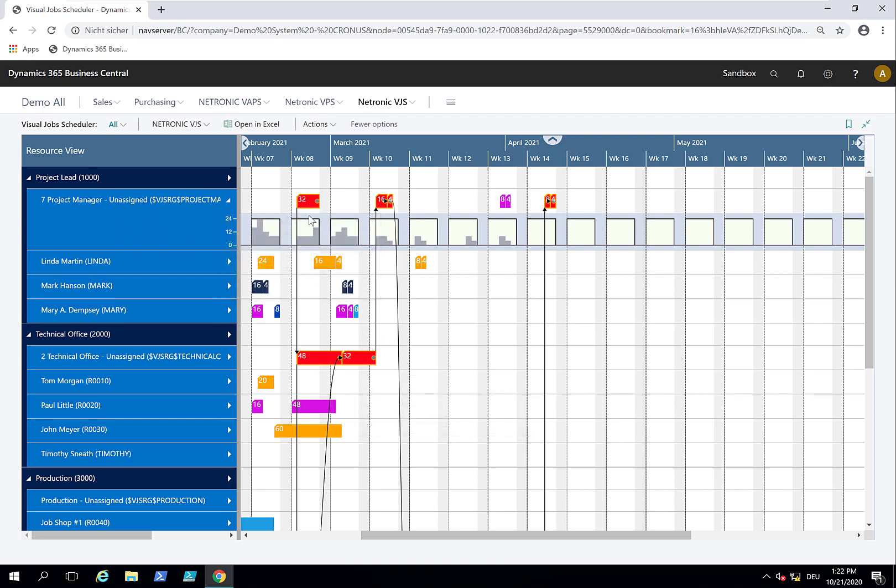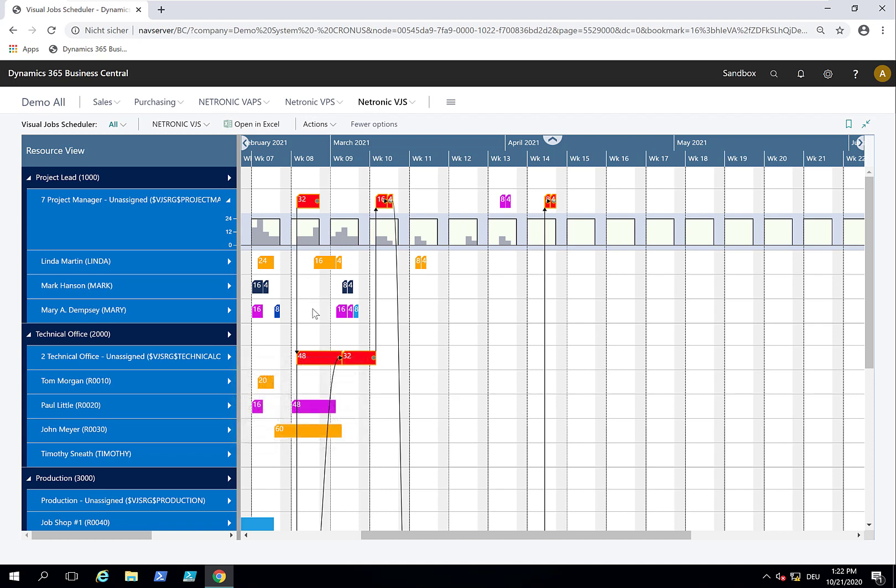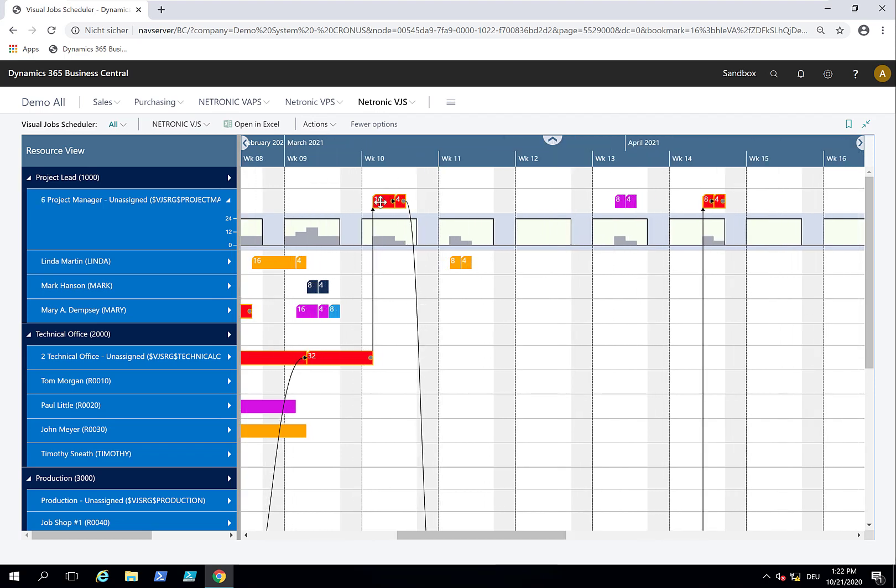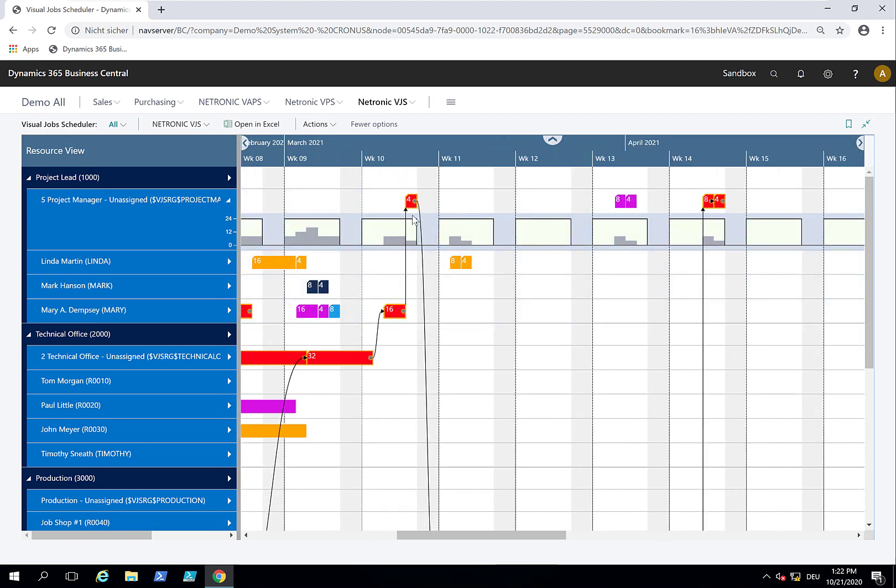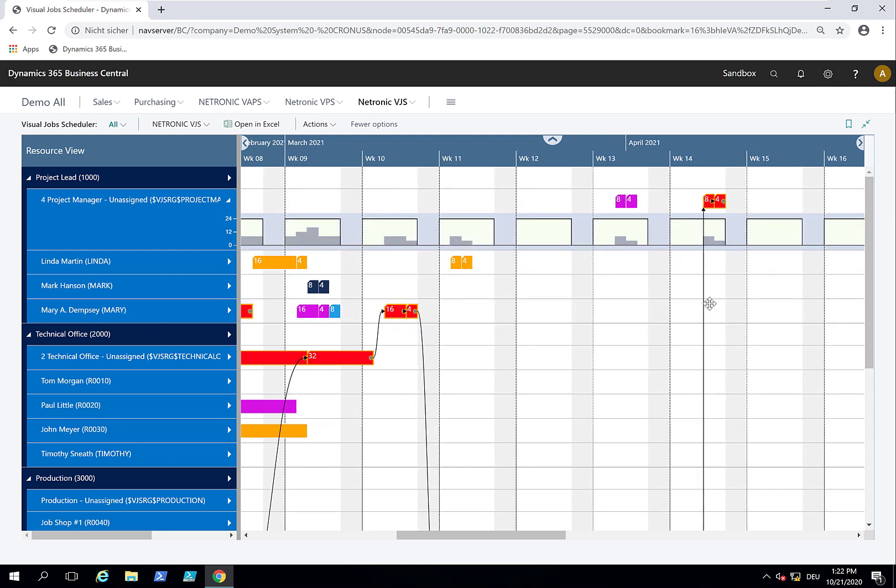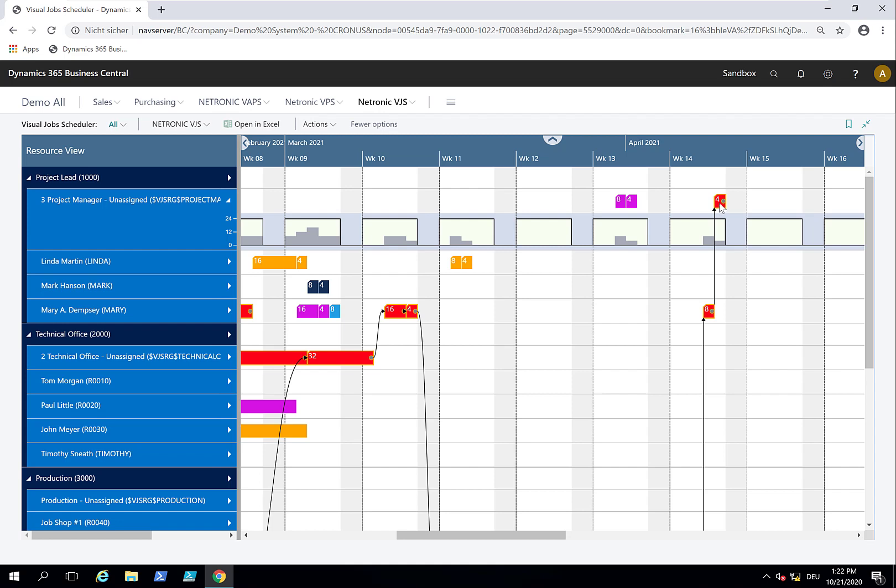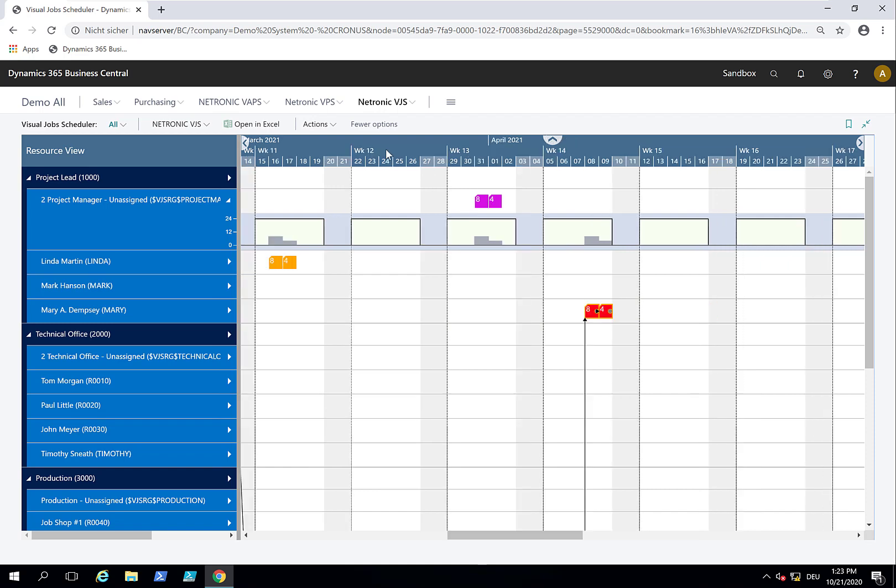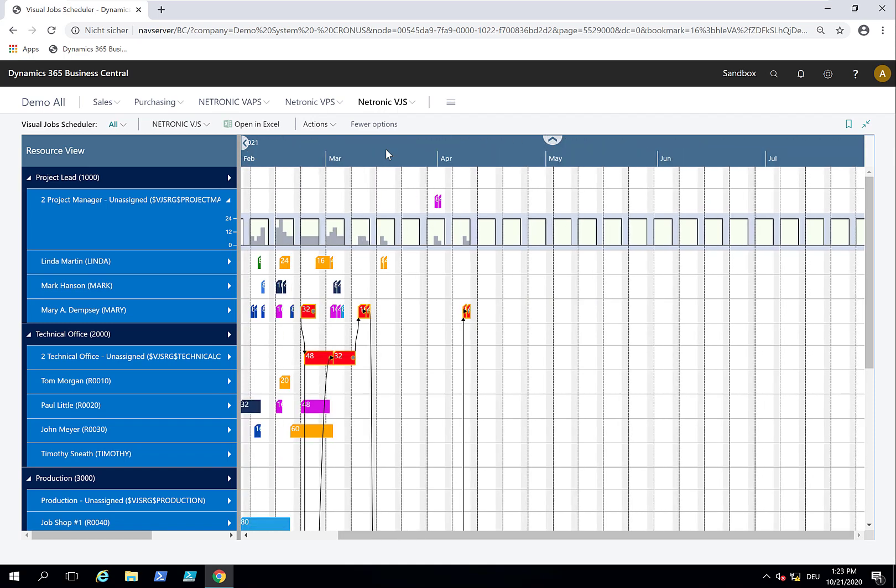Now I can schedule the project. For my project manager, I have free capacity with Mark and with Mary. I want Mary to be my project lead for this. I give her all the tasks, so I can assign all those tasks to Mary. Also what comes in the end of the project, I can really drag and drop stuff from a resource group to the resource, doing not only time scheduling but also resource scheduling.